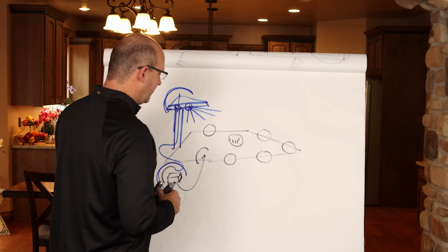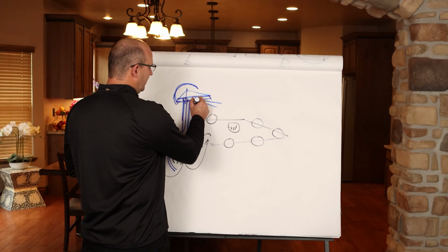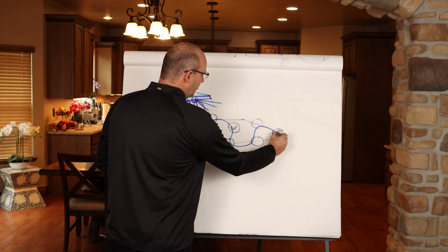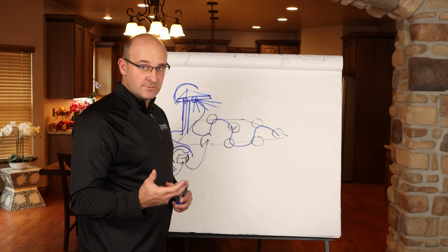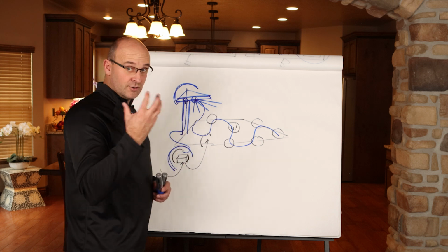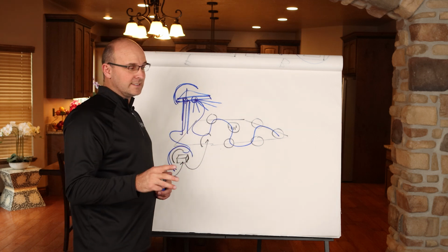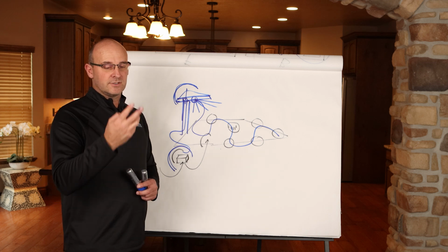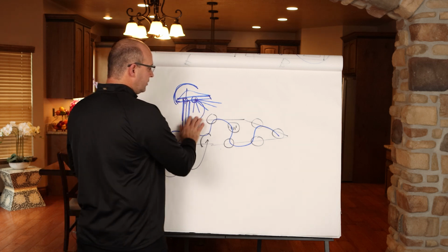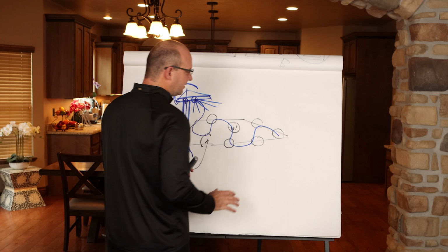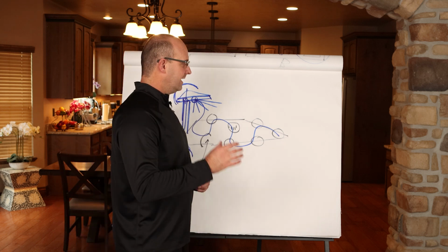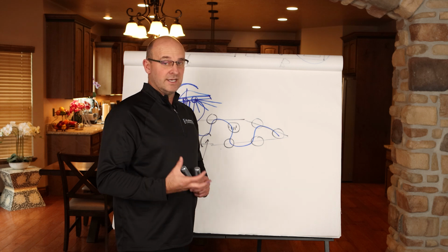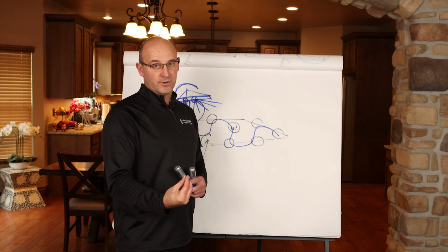This is priceless, okay? So as you're going through the project and you're observing, you're using your weekly work plan and your field observation to make sure, and your knowledge of the plans, right? Those are those three basic habits. Spend 15 to 30 minutes in the plans, 15 to 30 minutes in your production plan, and do field walks. You're using that to make sure that we're all heading in the right direction, and that everybody is heading at the same speed, the same distance apart, and everybody is working to optimize the whole of the project, right?